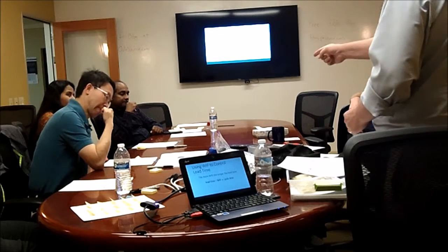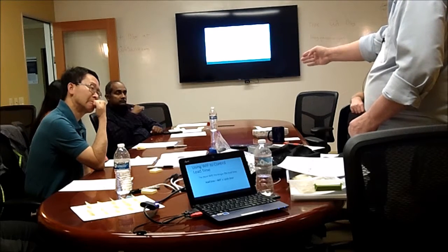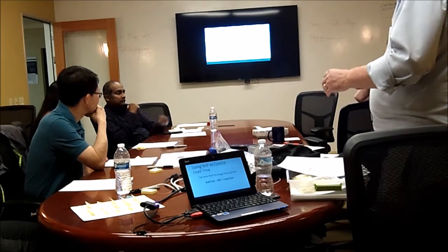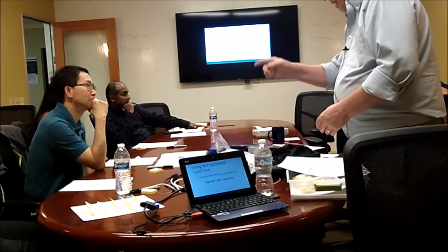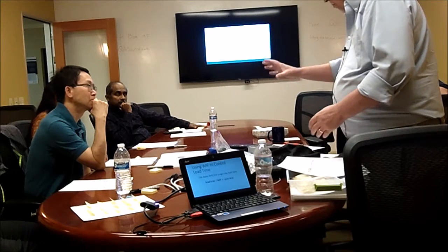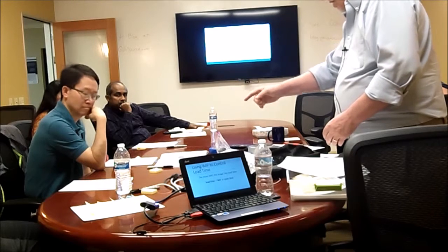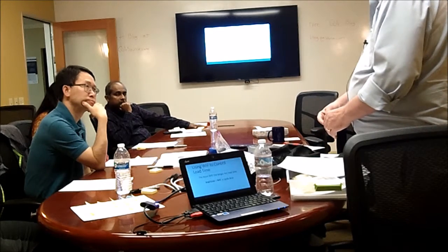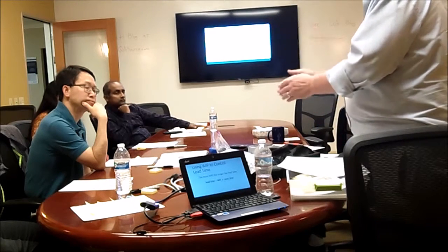So these calculations are assuming starting at the backlog. But if you were running a development operation or some kind of process, if you had a Kanban board, you could look at any of the units and figure out how many units are in front of it that it has to wait for, and calculate the lead time from there.